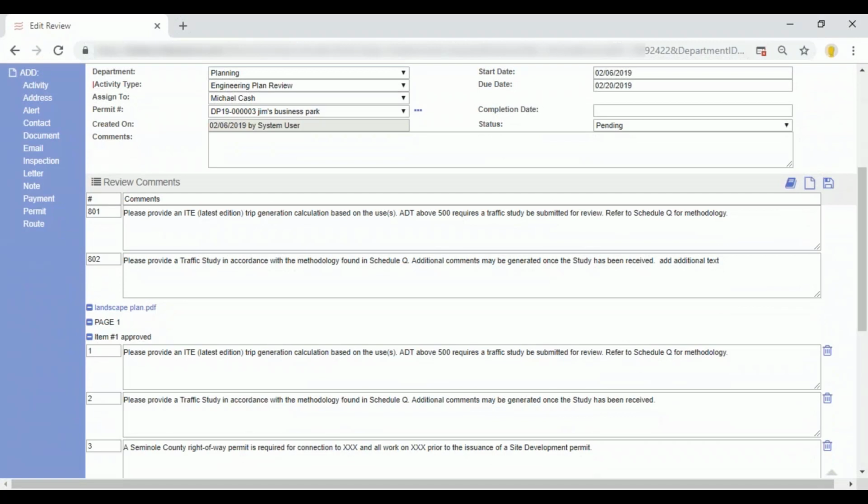This is what I was talking about earlier. Let's say you've got 10 steps and the first step is done. The feedback we're getting from our contractors right now is that they can see when that first review was done, and see the things that need to happen for electrical, so they can start working on that before the whole thing's done. I'm not waiting until the very end and then having to go through my whole process. It gives them the capability to keep working on what they can work on, or you can choose not to do that. That's a configuration option.